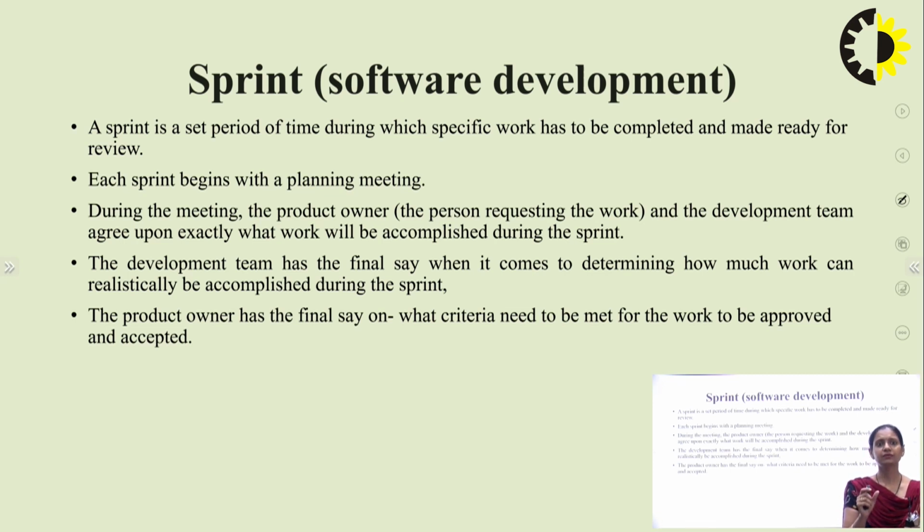The time period for a sprint could range between a few days to a few weeks or a few months. Now once the sprint time has been decided, the sprint length should remain constant throughout the product.